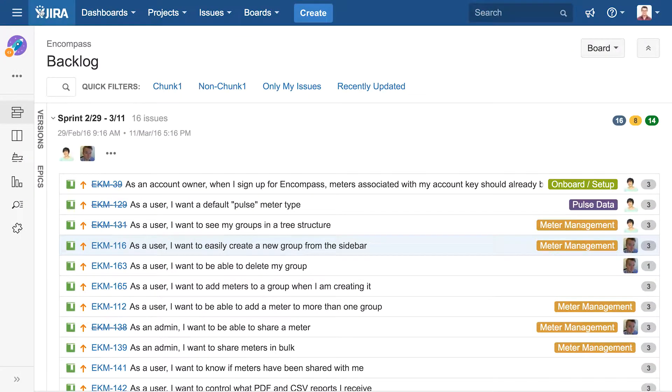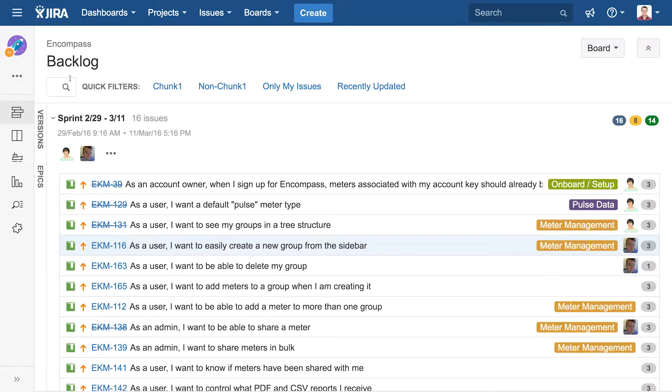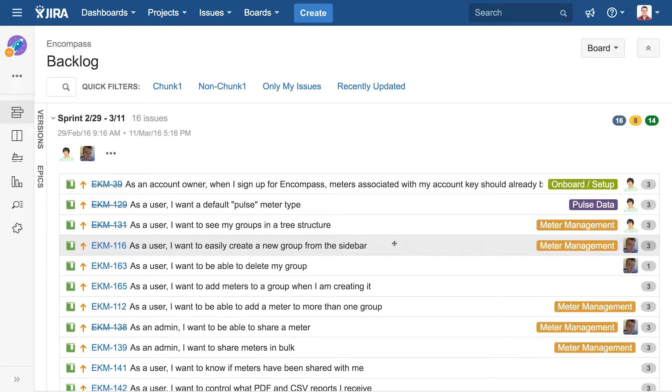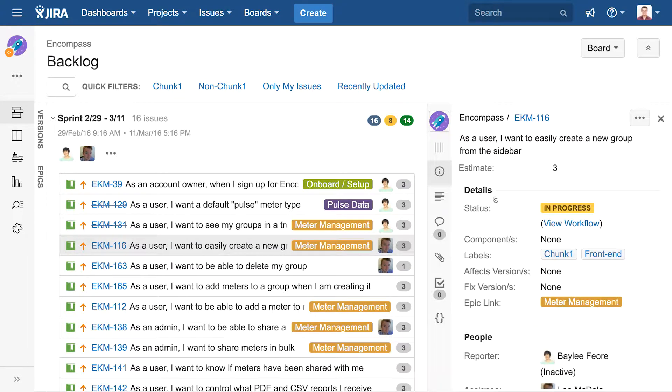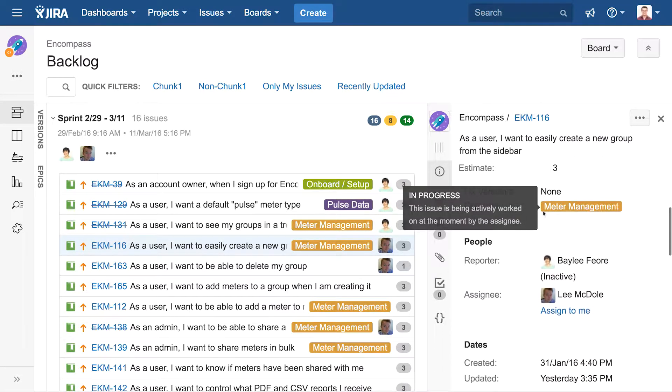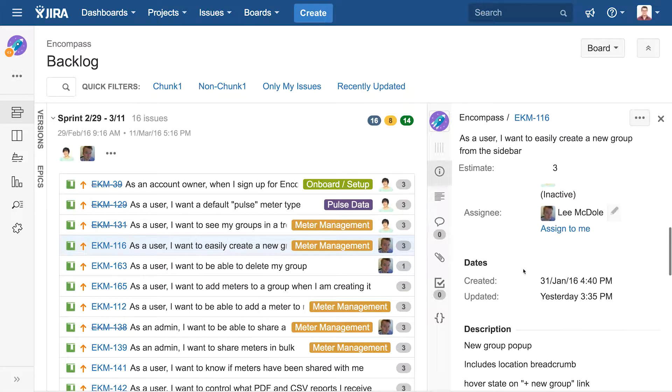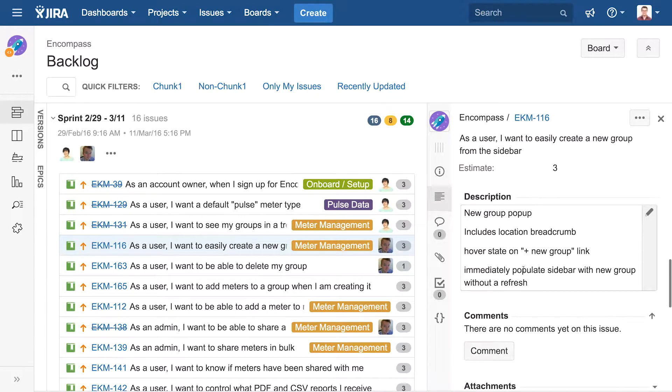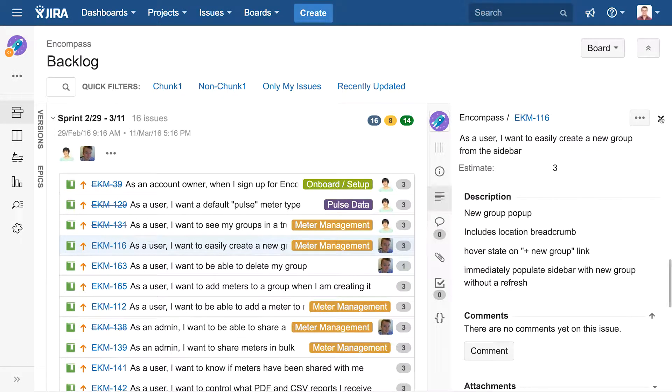Essentially, let's say Jira for example, it lets you create sprints, add point estimates to your stories, group them into epics, log bugs, and prioritize the stories. You can see for the current sprint what stories are yet to be worked on, which ones are in progress, which ones are finished and need review. It really helps manage the flow of accomplishing stories and organizing them into sprints.